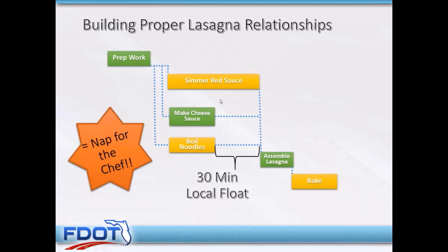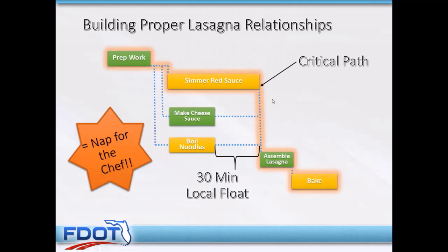And as I said before, the red sauce though is a different animal. It is, wait for it, it is critical that the red sauce start and begin on time, because if it moves to the right, or if this bar stretches and you have to add more time, then it's going to push these later events farther into the future, and that's something you don't want.